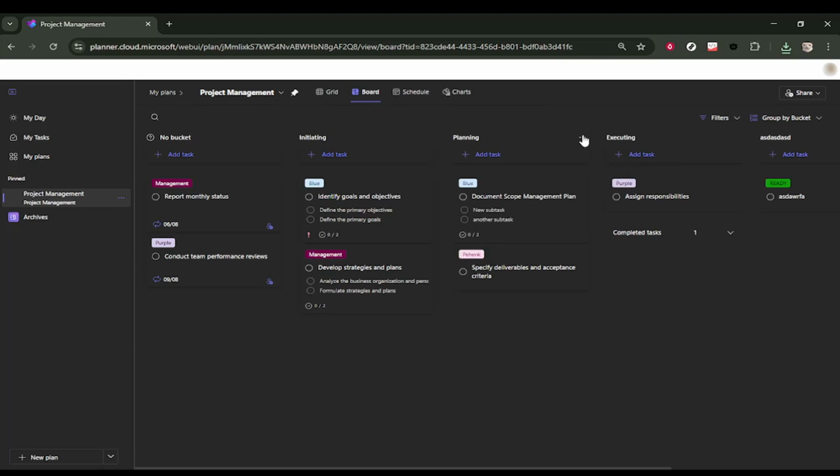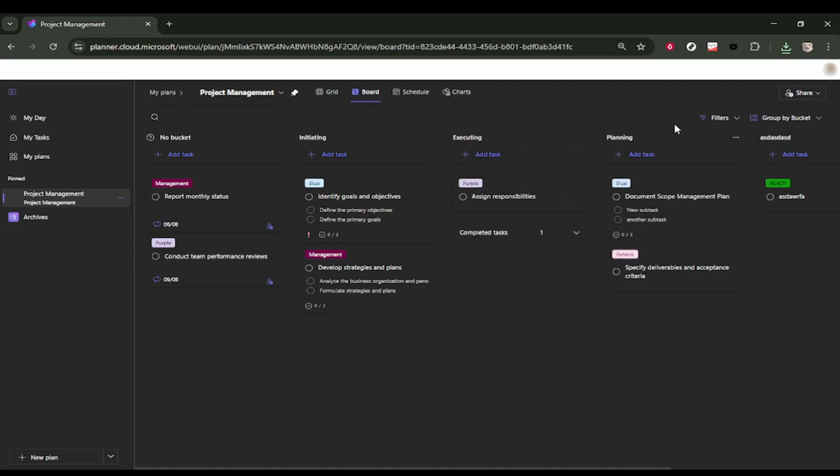While you are in Planning, keep in mind the keyboard tips shown in Planner. You can use the left and right arrow keys to move through important task information. Press Enter to open all task details. Most importantly, for reordering, you can use Ctrl plus the up arrow and Ctrl plus the down arrow to move the task position. This is a quick way to rearrange tasks within the same list order without dragging.